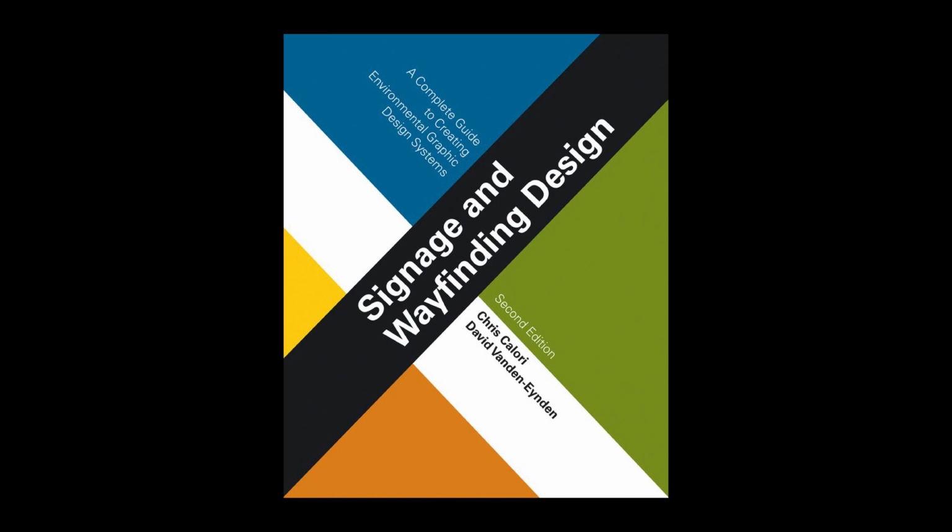Phase 4 results in several documents that convey the final design intent to the client and other parties involved in procuring fabrication of the program: final sign location plans, final message schedule, final sign graphics drawings, final sign hardware drawings, technical specifications. The EG designer wouldn't have progressed to Phase 4 without client approval of the big picture presentation of the program's design in Phases 2 and 3.